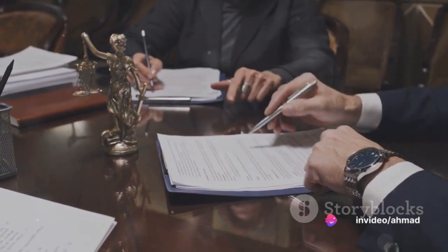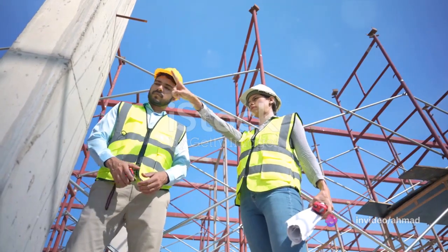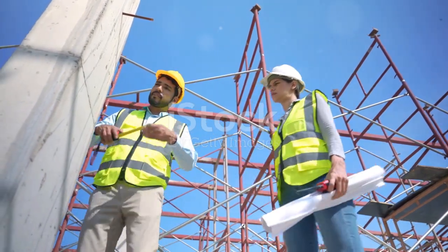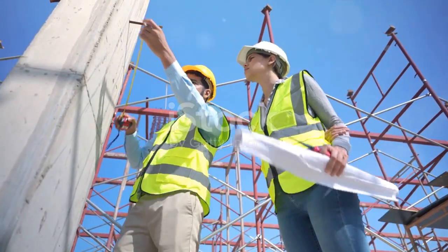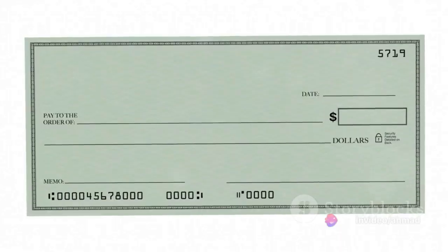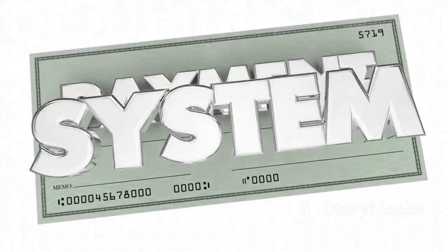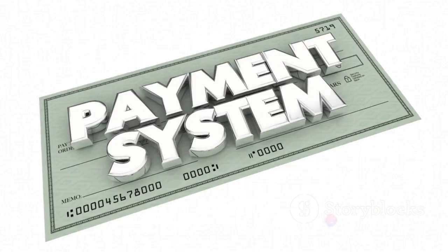Philip then unpacks the advantages and risks of terminating under the JCT design and build contracts for both the employer and the contractor. For the employer, they can require the contractor to remove themselves from the site and can obtain copies of the contractor's design documents. They also have the power to withhold further payments or release retention until the work has been completed by someone else. The contractor, on the other hand, can quickly submit their accounts and get paid within 28 days of submission.